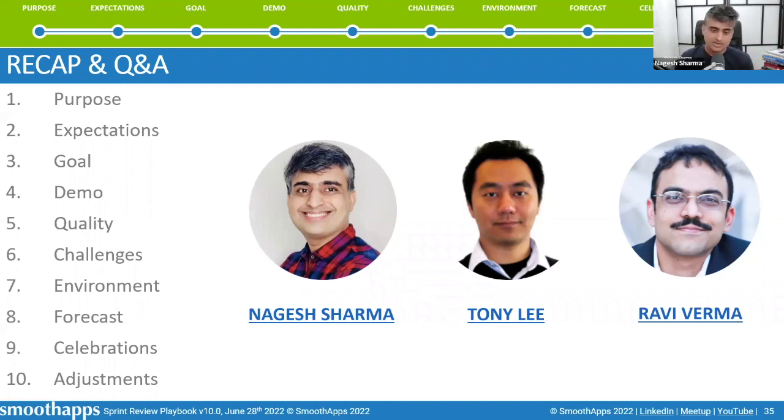So what we tried were a couple of techniques, like a science fair. The science fair is more or less like each team has some kind of station, because we were developing radiology products. So a team has a station, another team has another station, and so on. And they are ready to show the demonstration of their increment. And the customers and stakeholders are doing something like a gallery walk. So it's like a science fair, and it is very engaging, very helpful. One team can also visit other teams. So in that way, we found very much value, Trish.